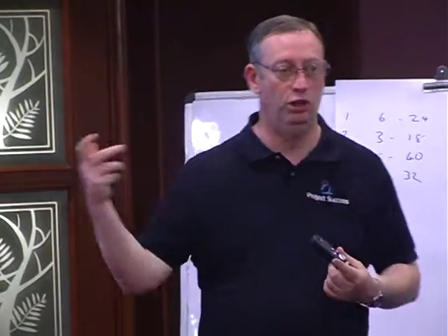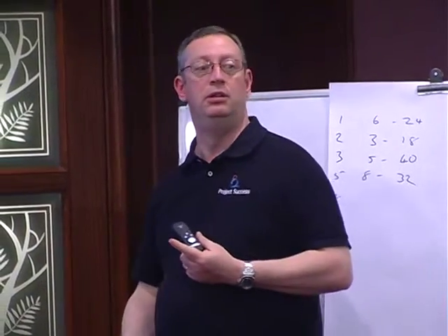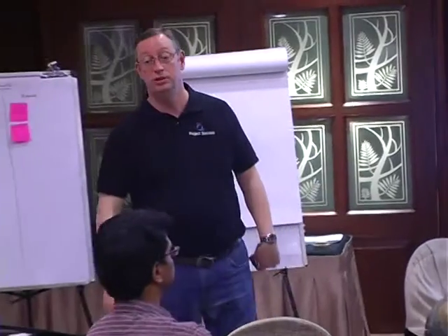This is the only chance in the sprint that you actually have a formal opportunity to sit there with the stakeholders, and all the stakeholders as a group. If a particular scenario is not thought through or hasn't particularly existed, then that's going to be something new that goes on the product backlog, and we will extend the product to do that in a future sprint.